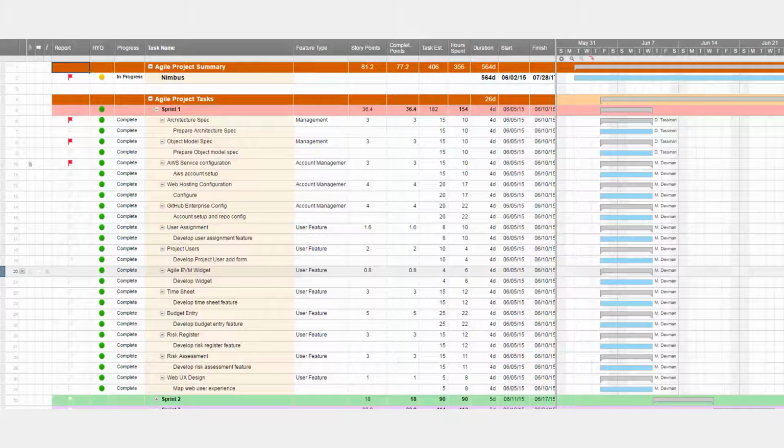This is what the Agile schedule looks like. I did this in Smartsheet. I do not normally use Smartsheet for this. I use a much more robust Agile planning application, but this was a new thing for me. But even though this is a waterfall style tool, I'm still able to use the sprints. I'm still able to use children elements and calculate upwards to determine all of the different things that I need to determine. I'm also not used to the Gantt when using Agile, but this is an automatic Gantt chart that basically tracks all of the different things that are going on.